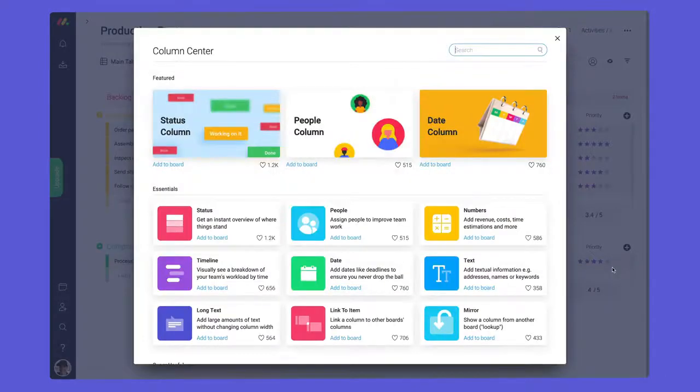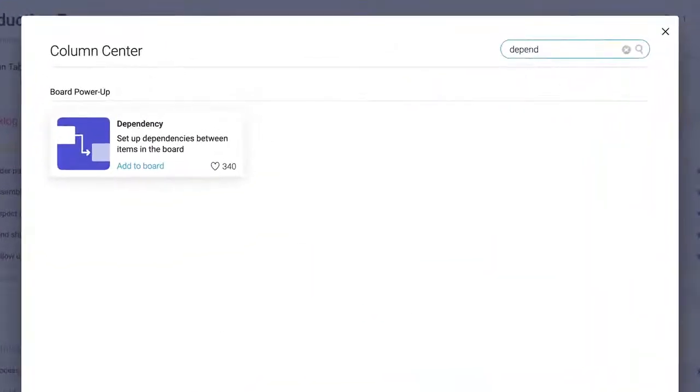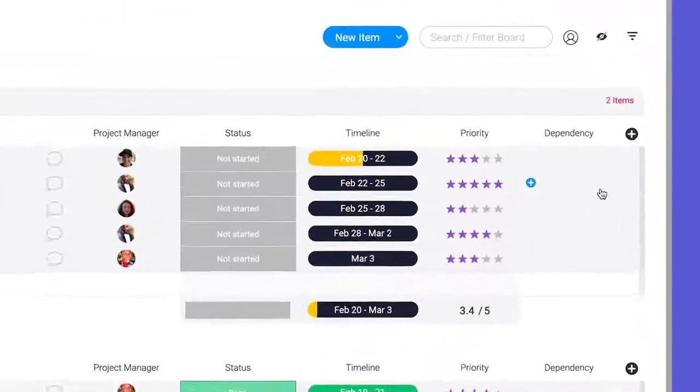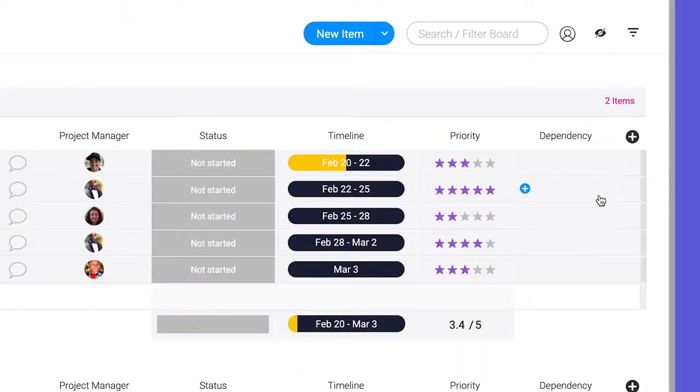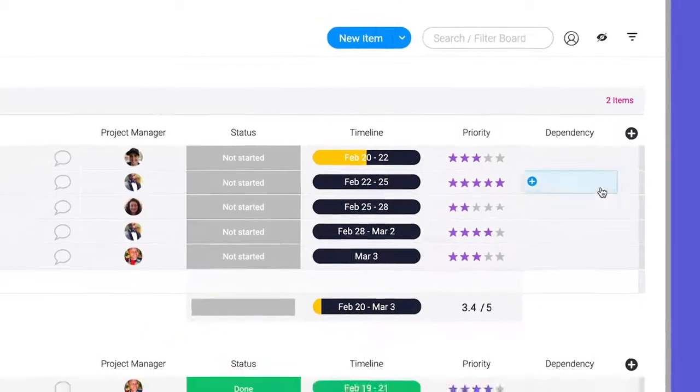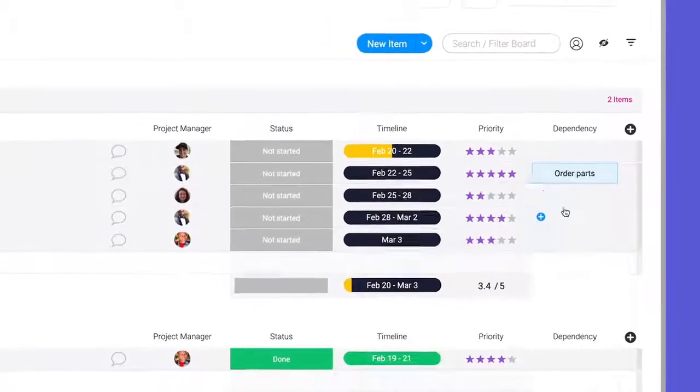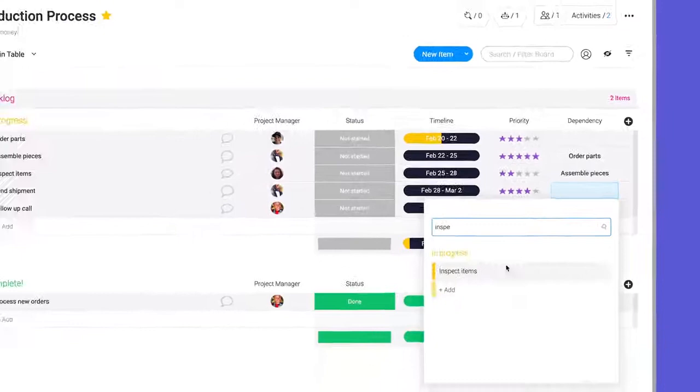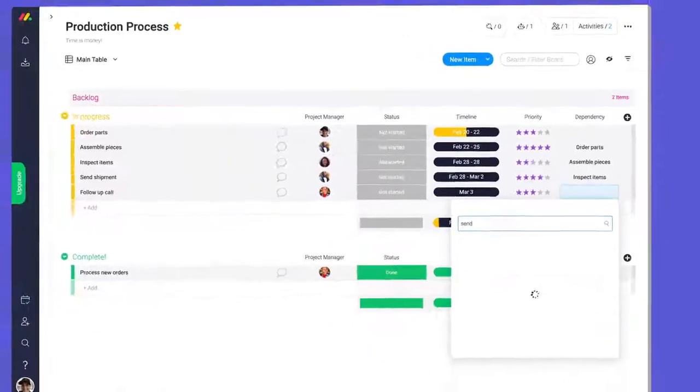Before adding dependency automations, we'll need to add and configure the dependency column. Here, we'll select which item each task depends on. Since these tasks are in order, I'll select the item above for each one.